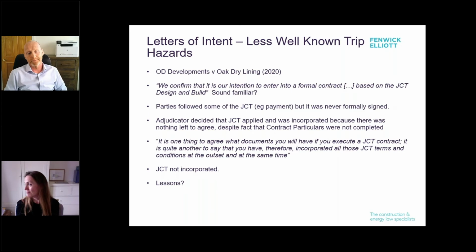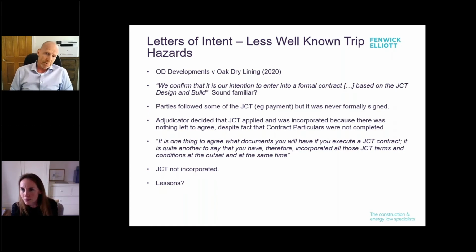The adjudicator, when he was appointed, went off and said, well, I can see what's happened here. There's an intention to enter into a building contract. I can see roughly that all those bits that would be in the contract particulars have probably been agreed. We know roughly what programme we're working to. We know the price. We know what we're building, but it was never actually filled in. So the adjudicator said, I think that building contract is incorporated and therefore that is the terms.